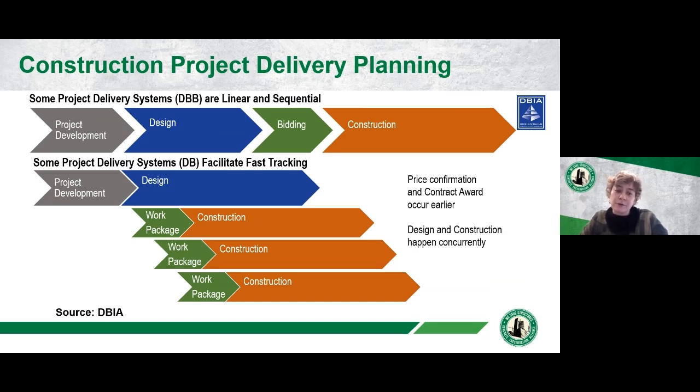Compare that to design build, which has inherently a lot of schedule savings. The reason for that is that there's the ability to have what we call early work packages or separate work packages, where once the design is far enough along for certain parts of the work, you can piece off that work package and then begin construction on that portion of the work. This allows very large projects to get moving much more quickly, which has significant advantages for owners. Next slide.